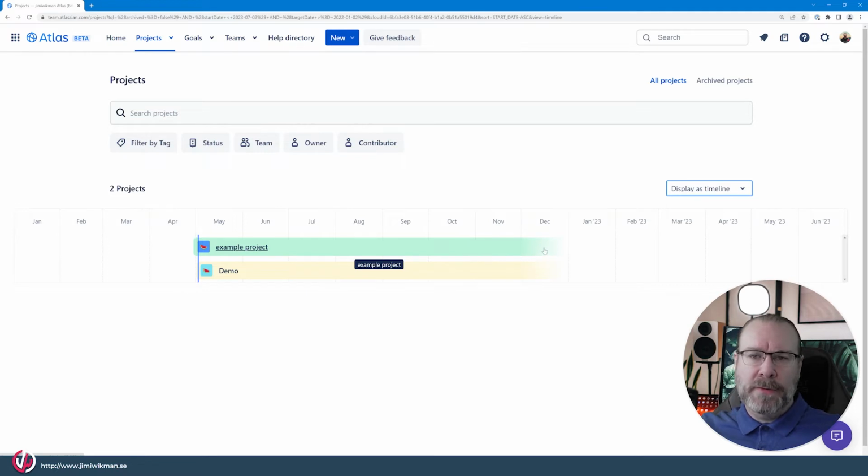And you also notice that by default they are toned out, so they don't have a fixed date per se. It's part of the design, and it's very agile in that it doesn't really have an end date. And if you look at the keynote, they actually show this as becoming more and more clear the closer you get to the end. So you start with a very generic definition, maybe what quarter or what year. And then as time progresses, you will come down to a month, and later on you will come down to a date.